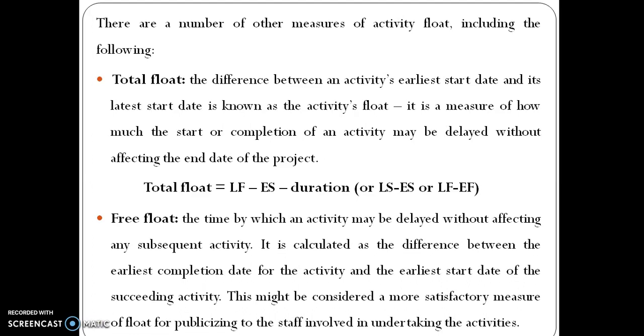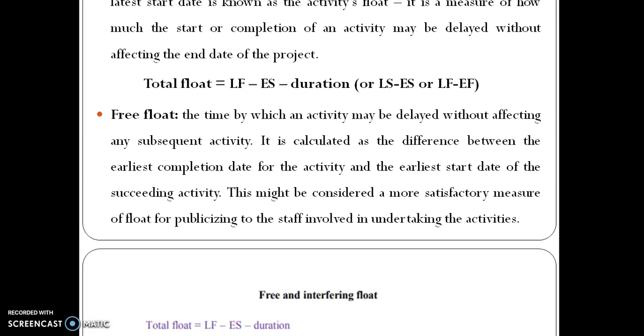Free float: the time by which an activity may be delayed without affecting any subsequent activity. It is calculated as the difference between the earliest completion date for the activity and the earliest start date of the succeeding activity. This may be considered a more satisfactory measure of float for publicizing to the staff involved in undertaking the activities.